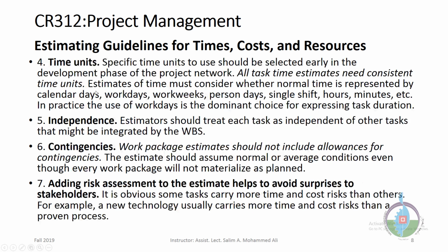Number 4, before beginning your project, you have to rely on time units. Specific time units should be selected early in the development phase of the project. All task time estimates need consistent time units. Estimates of time must consider whether normal time is represented by calendar days, work weeks, person days, or single shift hours, even minutes. In practice, the use of work days is the dominant choice for expressing task duration.